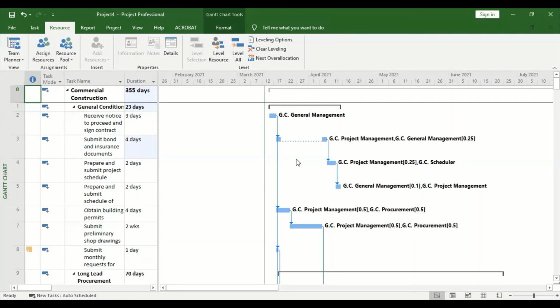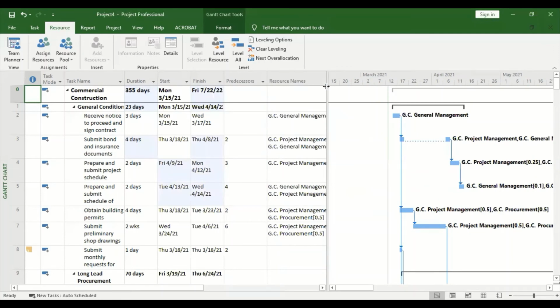So is it clear? Yeah, that duration which is extending is actually telling you the cost of that extension. And then you compare when you are not leveling, then you decide when you should level it, or you leave it like that as long as it does not affect you. There are some projects which are not so time-sensitive. Like if it's just an additional 10 days, it can be delayed and you're not incurring more costs, because sometimes when you delay the project, you may incur more costs. So you also have to look at that.